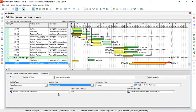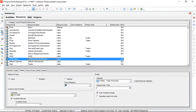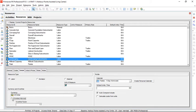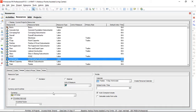As you can see, landscaping subcontractor is the resource. We can select resource page on the left hand side menu. Landscaping subcontractor is in here. We need to check this overtime allowed box and select an overtime factor for it. At the moment, I've set it to 1.5, which allows 50% overtime on top of normal time for this project.